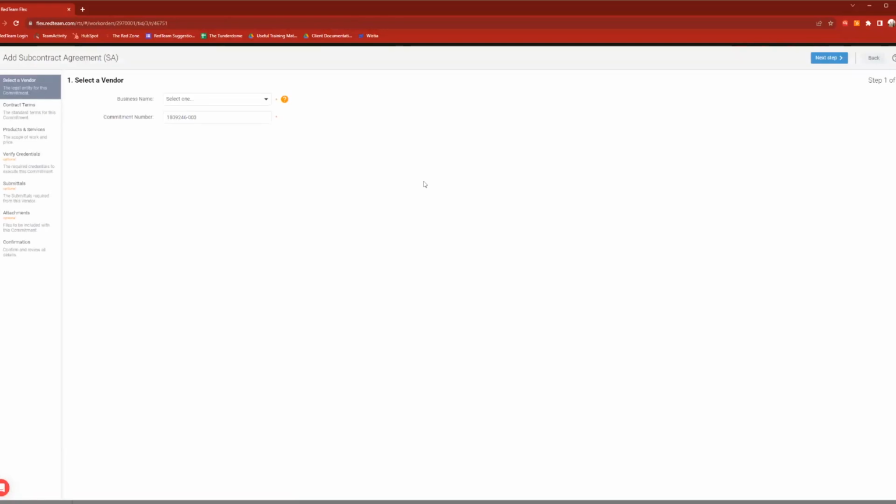First thing it's going to ask me for is who are we writing this with? I can select from the drop down here. You can also type in and search. Let's see, we have one of our vendors here, Extra Solar, that we're going to use. It will then load in any quotes that you have from them. Now, I don't have any quotes from this vendor on this project, which is completely fine. We can still create a subcontract without having any quotes. Really, all that's going to do for me is autofill some things. It'll pull in some information from the quote itself, but we'll just say we don't have one in this case.